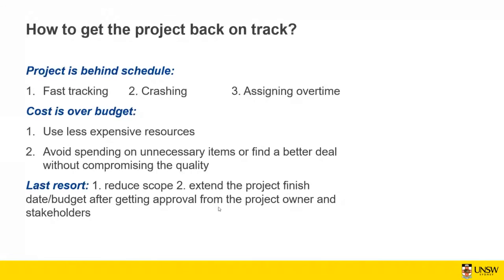Or you can extend the project finish date and budget after getting approval from the project owner and stakeholders, which again is not going to be an easy thing to ask, but sometimes you don't have any other option other than either reducing the scope or delaying the project and asking for more budget.